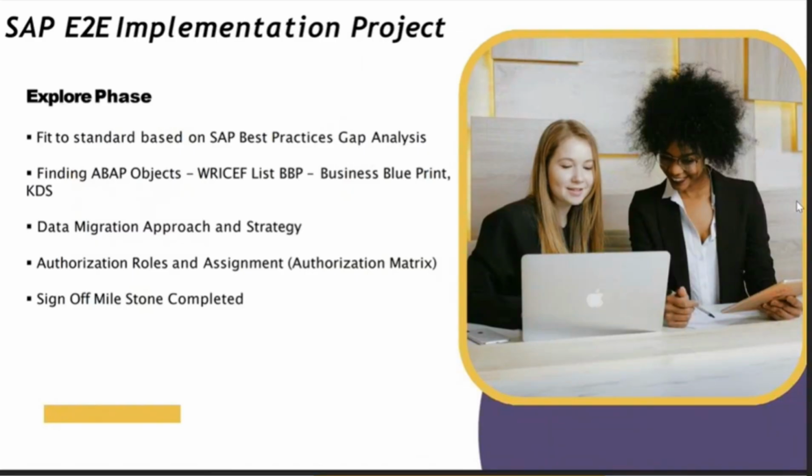So next we'll go for the explore phase. Okay, what is the explore phase I have to do, right? Till now we have discussed the scope document. Based on the scope document, I have to prepare the BPML, right? Okay, fine. So now what do I need to do in the explore phase? The explore phase is the fit to standard workshop.